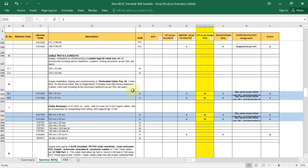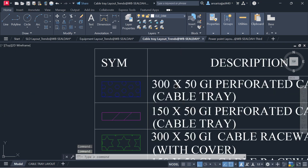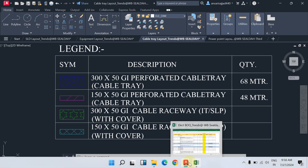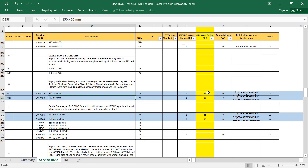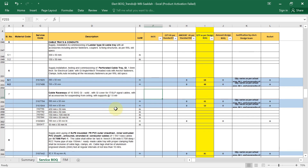Now for the cables — the cable tray and conduit detailing. We are using perforated cable trays in two sizes. From the cable tray layout: 300x50 perforated cable tray quantity is 68 metres, and 150x50 perforated cable tray quantity is 48 running metres. The unit is metres, so I have entered 68 and 48 accordingly.